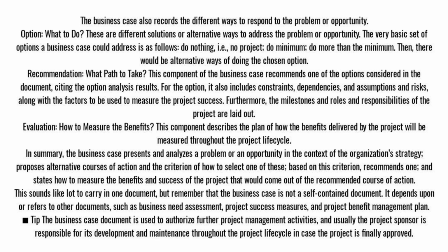In summary, the business case presents and analyzes a problem or an opportunity in the context of the organization's strategy, proposes alternative courses of action and the criteria of how to select one of these, based on these criteria recommends one, and states how to measure the benefits and success of the project that would come out of the recommended course of action.